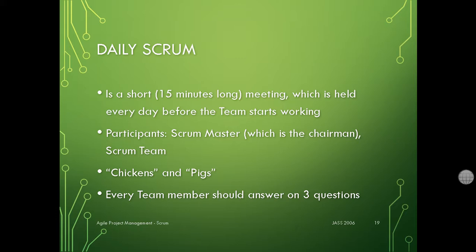So in total, if your sprint is going to take 4 weeks, maximum, and please try to make it lower than 4 weeks. Make it about 2 weeks or something. Okay? If it's going to be 4 weeks, no problem. Just plan your sprints in the table I have put for you in the notes, alright? For each sprint.